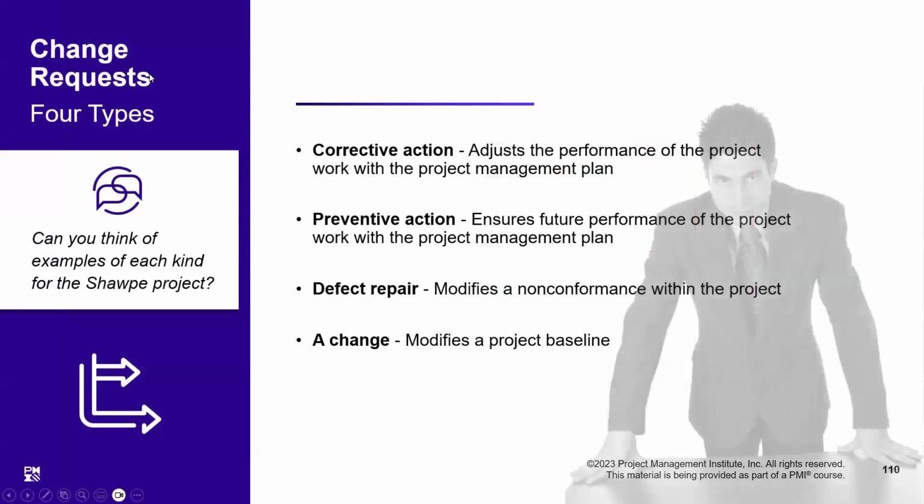Okay, then what are the different types of change requests? There are four types of change requests. One is called corrective actions. That is, something has gone wrong and you want to correct it. How can we correct a flawed deliverable? Flawed deliverables are the output you have produced. There is a problem with that, and we have to take necessary actions to correct that. That is called corrective action. This is about the processes. If the process is incorrect, then we will advise them to correct it.